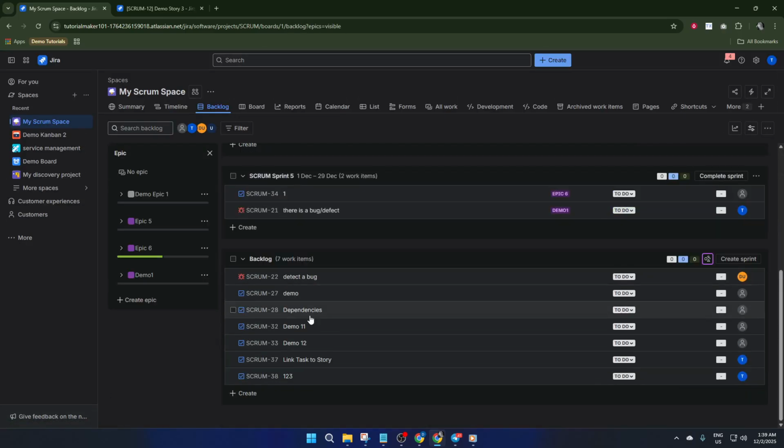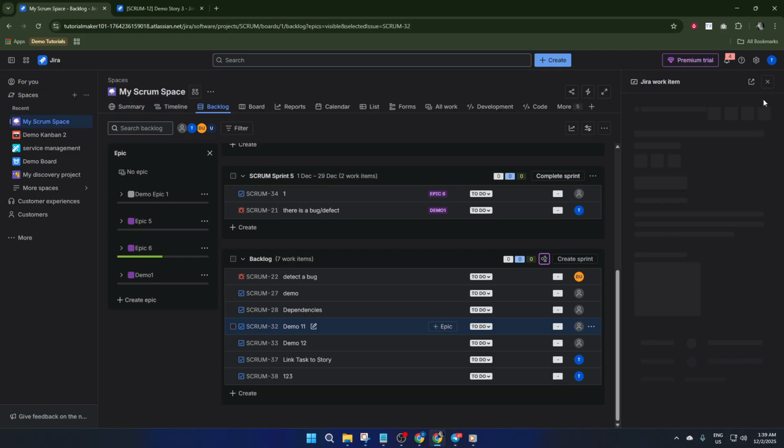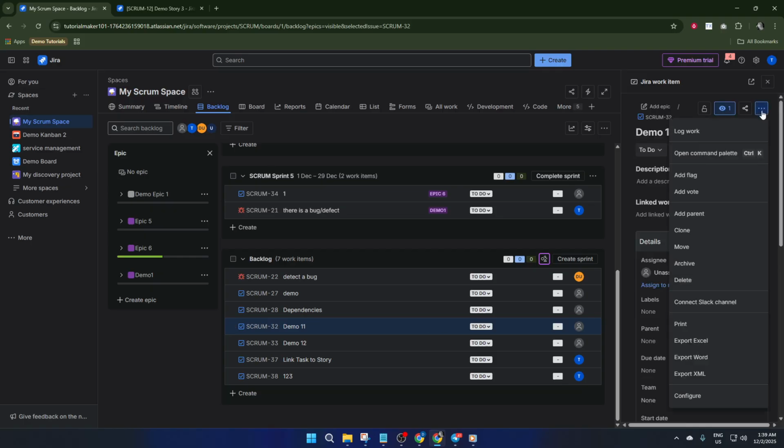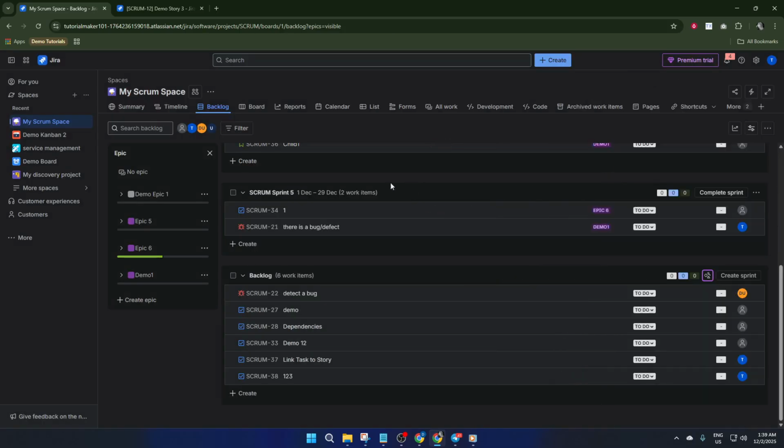Jira may prompt you to confirm, just as an extra safety check. When you confirm, that work item is removed forever. There's no going back or restoration option, so always pause and consider if the issue really needs to disappear for good. Maybe double-check with your team, or check if there's anything in the issue comments you want to save before you delete. Remember, archiving is temporary and reversible, perfect when you're unsure or expect changes, while deleting is permanent. Use the right tool at the right time to keep your Jira project clean and effective without losing anything important along the way.